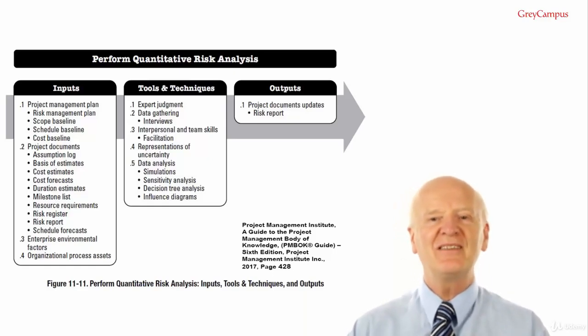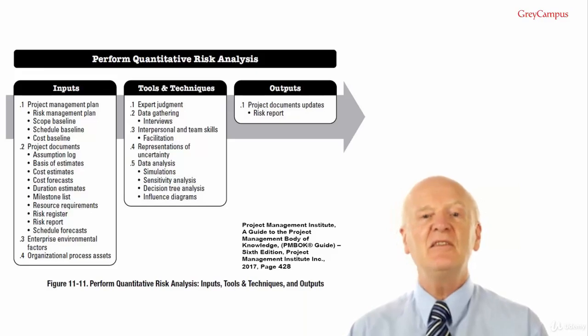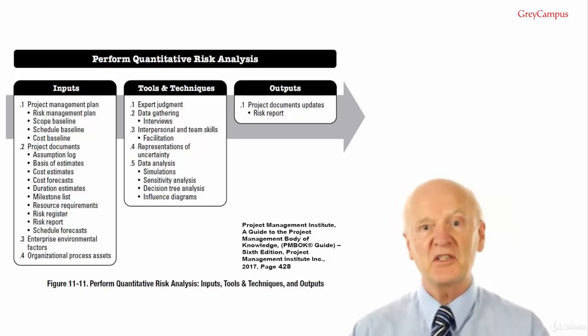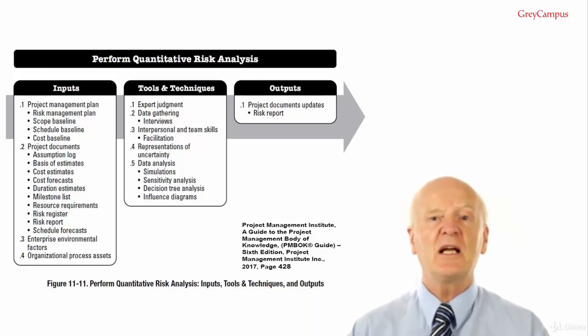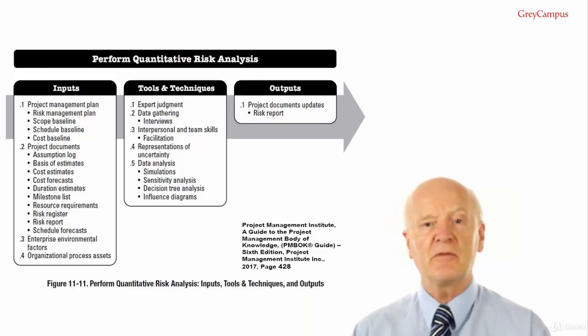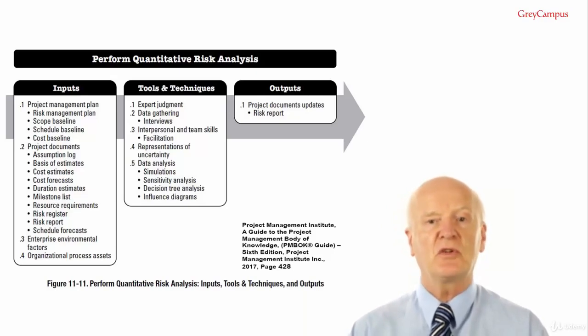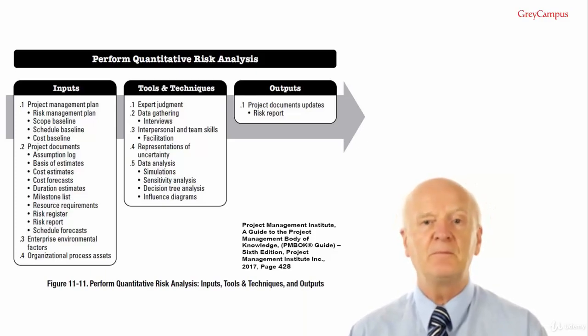Where risks are related, for example, with a common cause or a logical dependency, then you need to take this correlation into consideration. For example, if the flow of coolant in a pipe is too low, it will cause a series of motors to fail. But the temperature of the coolant pump increases with coolant flow, and there is a risk of the coolant pump failing.